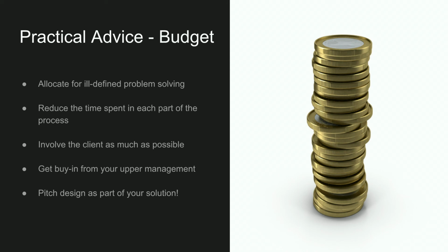And it's difficult because sometimes you're trying to match the budget that the client already has. But as much as possible, try to do that. Try to include it from the beginning so that there are no surprises later on and you don't end up with a solution that is not that great because you didn't spend enough time on the design part. You can also reduce the amount that you spend on each part of the design process, of the design sprint. Like I said before, you don't have to do one full day for each phase. It can be half days, it can be blocks of 2 or 3 hours. You can adapt that part and it works well depending on the problem.